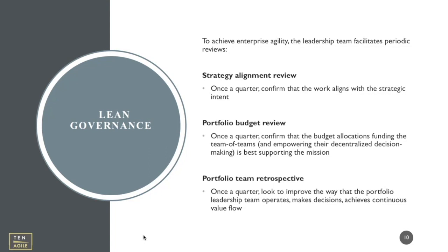The best time for this is, because we are looking back at how our quarter went, generally at the end of the PI. That way you can take the improvement items and execute those items in the next PI. So generally, it should be towards the end of the PI or the quarter. Okay, thank you so much.